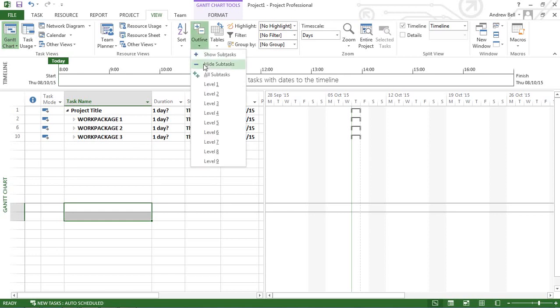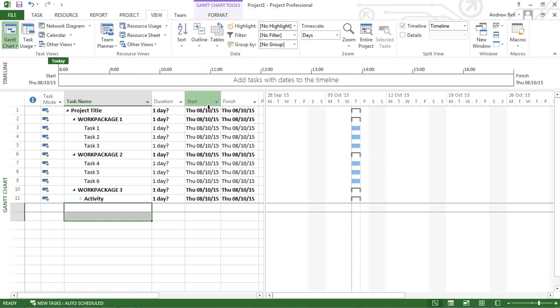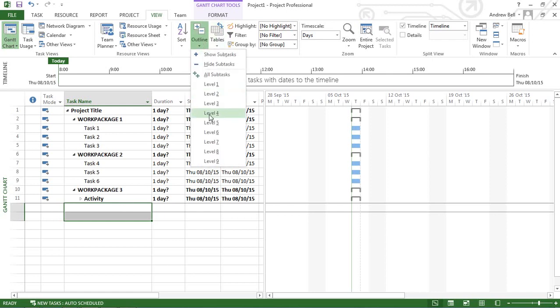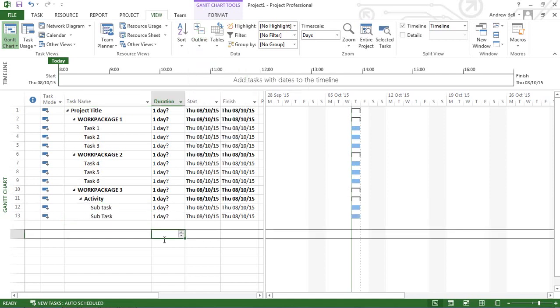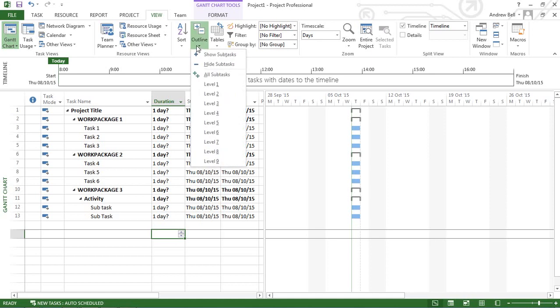Again, I can show level threes. And now I've got this fourth level at the bottom, I can show level four. That's actually going to be all subtasks in my case. So using this outlining, the indent and outdent will outline your project. We can actually easily control nine levels using this dropdown.